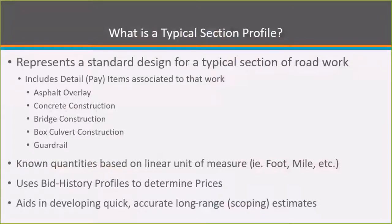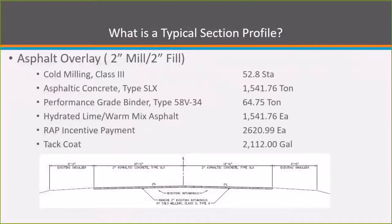Some examples of profiles that have been created include asphalt overlay construction, concrete bridge construction, box culvert construction, and guardrail. These profiles are created because the quantities are known and they're based on a linear unit of measure — either per foot or per mile. The profiles can use what's called the bid history profile to help determine prices based on previous bid data. These profiles help in developing quick, accurate, long-range or scoping type estimates.